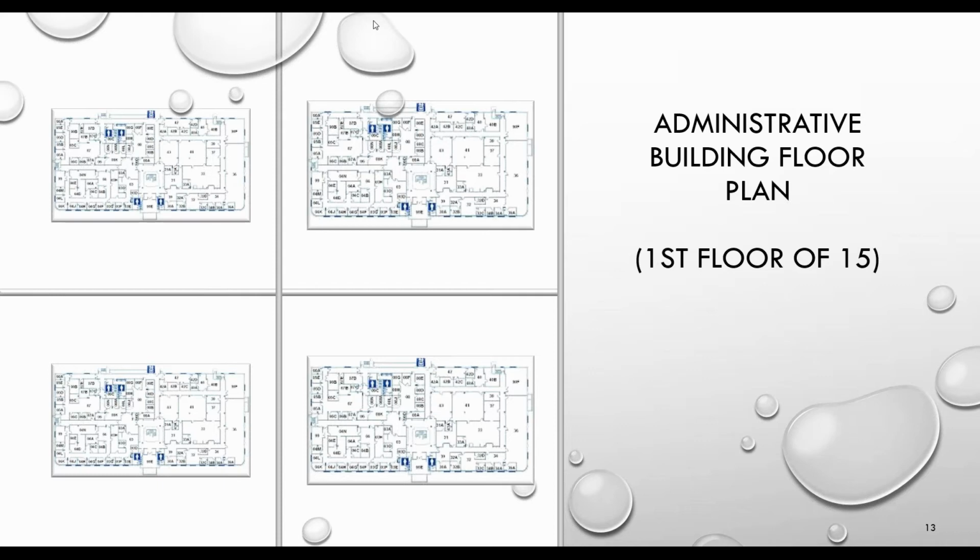The only difference between your scope on a small building and a large building is the time it takes to put it out. In the beginning day or two, you can keep your scope generalized, as I spoke about a while ago. We're going to extract water, we're going to set up air movement, we're going to set up dehumidification, we're going to do testing for asbestos materials. That's on every job, by the way. We're going to make sure that debris is picked up. We're going to talk about contents manipulation and what you've got to do with that.